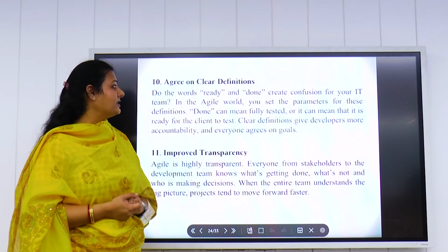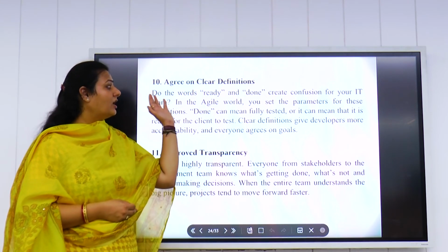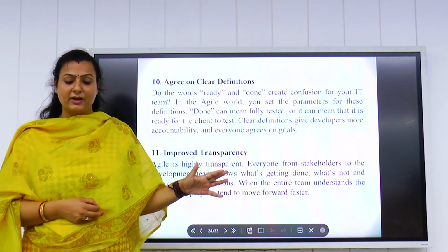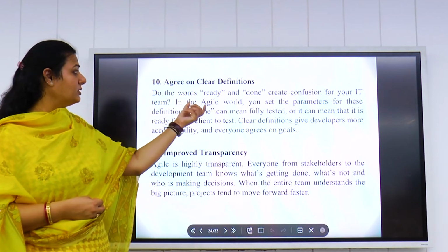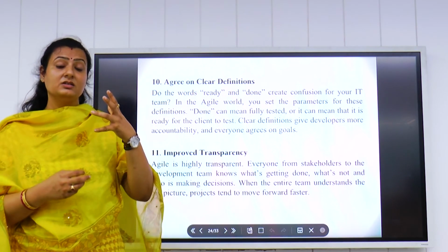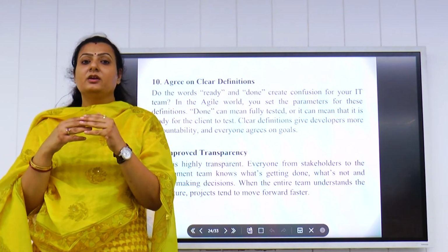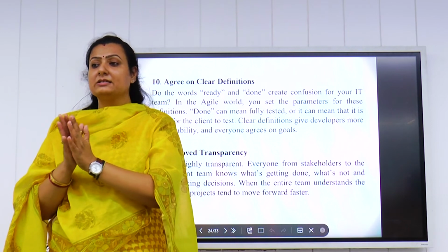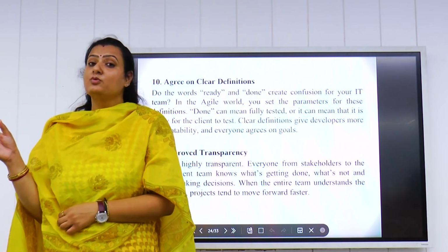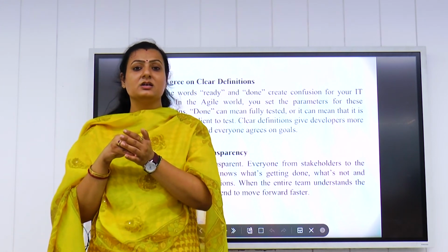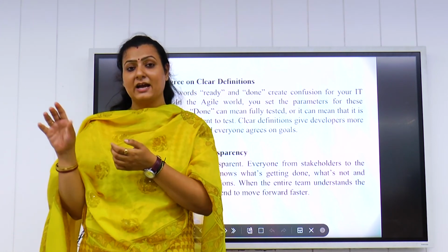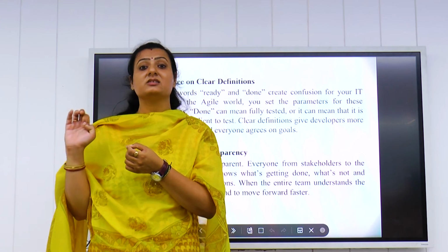The 10th is to agree on the clear definition. Here in the agile framework, the word ready or the word done is the most important, because when we are working on this, we say that this particular portion we have done. The word done means we have done all the design, development and the testing phase.